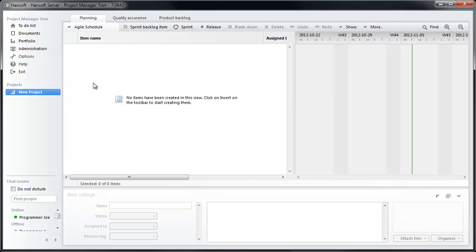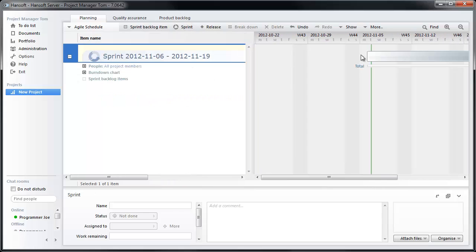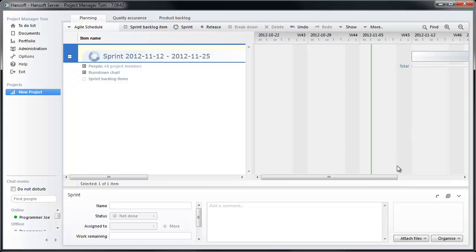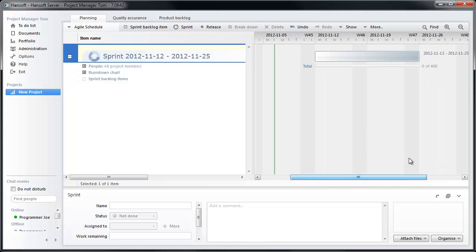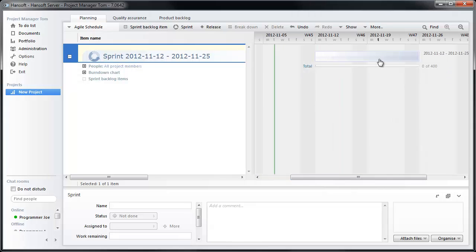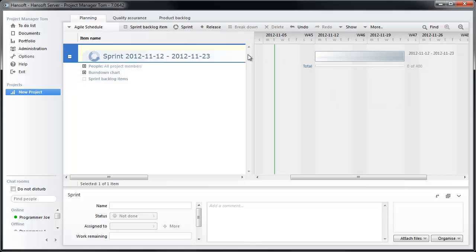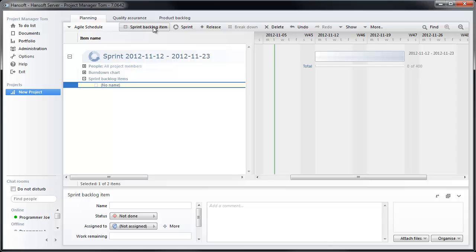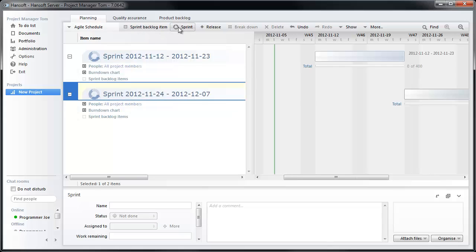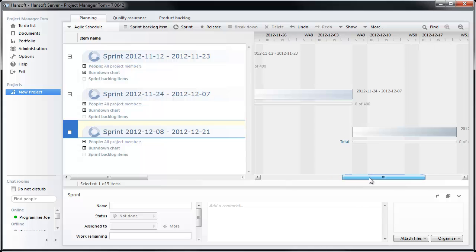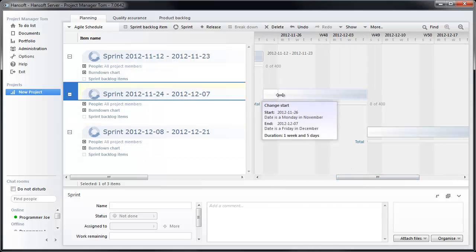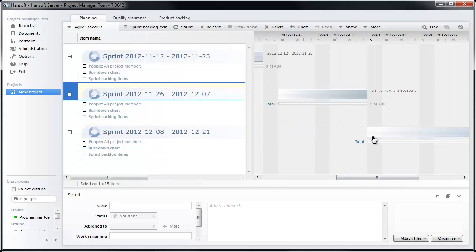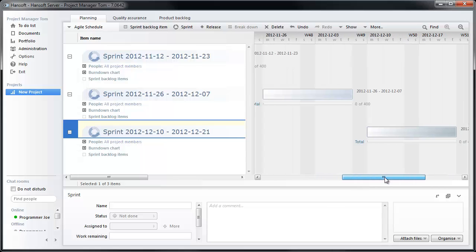So the first thing I want to set up now is a sequence of sprints. I'm going to set up our first initial sprints. Let's say that it starts in two weeks time like this. And I'm going to create two weeks sprints. You can now add another sprint and a third sprint. Let's not work weekends here. Let's set it up like this.